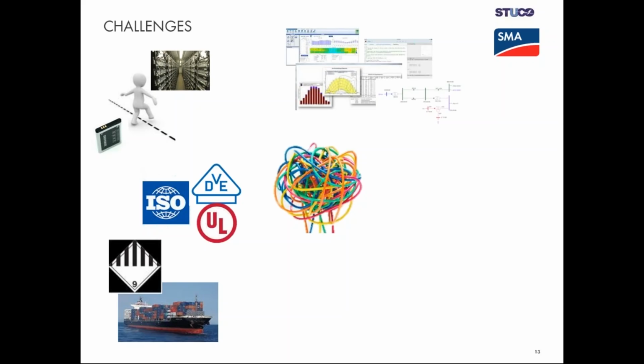And if you want to literally ship them from one corner of the globe, in this case Korea, to the Caribbean islands, it's not that easy. They are crossing some borders. And customs has a say in it. We had to translate, for instance, 30 so-called HS codes from numeric language to Korean to English back to European HS codes. Sometimes you feel like a pioneer if you're doing these things.